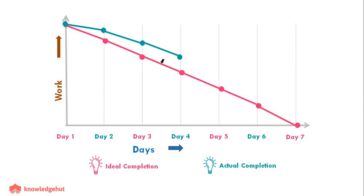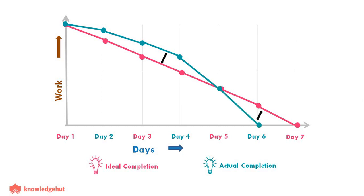If more work is remaining than what was expected, then it is time to buckle up and increase the efforts. If less work is remaining than what was expected, then you are probably going to finish all the tasks earlier than expected. You must have overestimated the required efforts and you should do proper estimation for the next time. So, this was all about the Sprint Burn Down Chart.